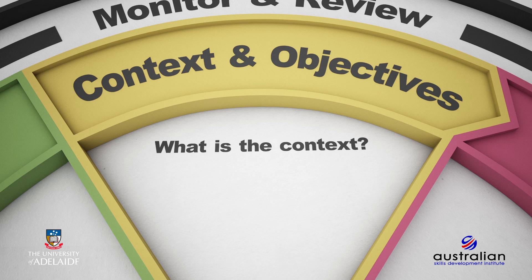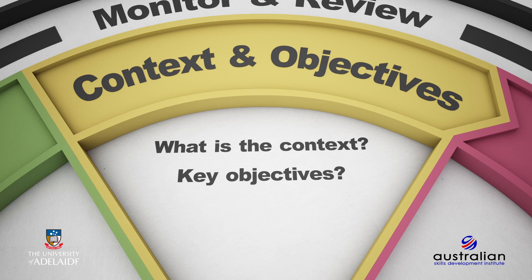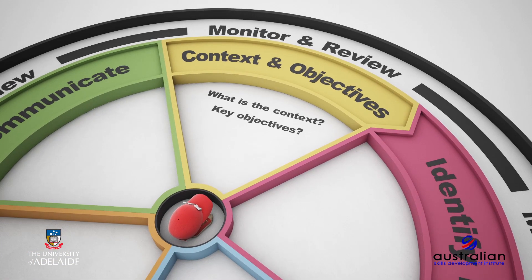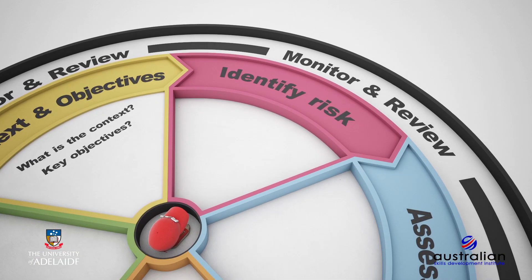In this course, we will apply the process to a project management setting. Once the context has been established, we can develop and agree on the objectives specific to our project. Second, what are the key objectives? You may recall that we defined risk as uncertainty on the achievement of our objectives. Therefore, it stands to reason that before identifying the types of risk or uncertainty we may be faced with, we first have to determine and agree on the project-specific objectives. Once the objectives have been specified, we can move to the second stage of the process.